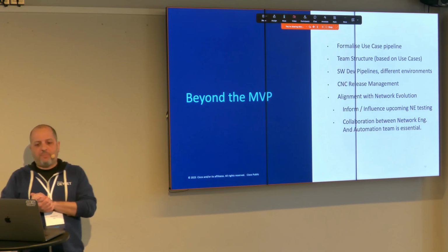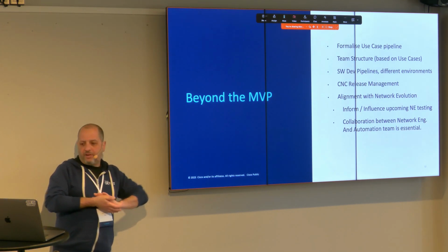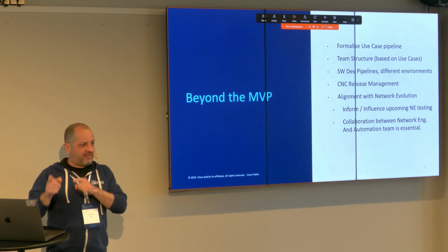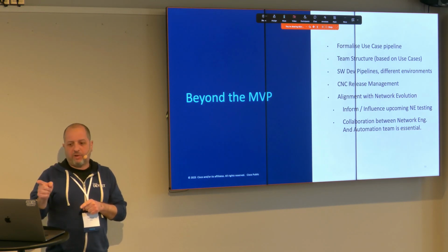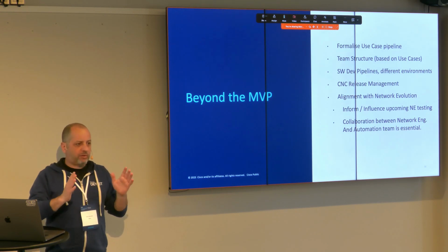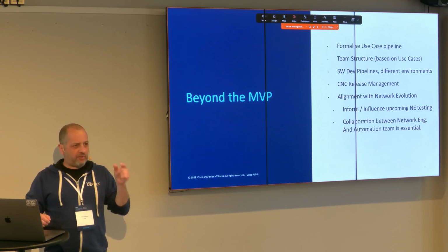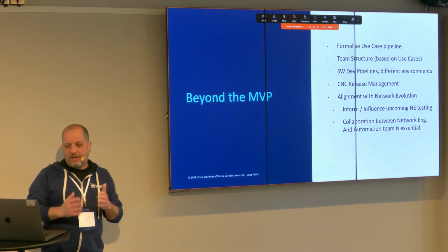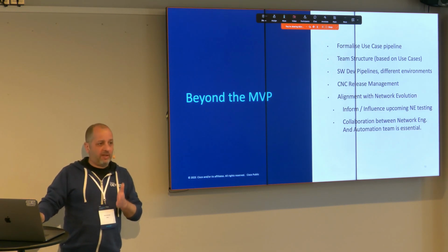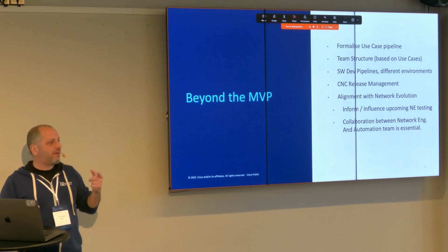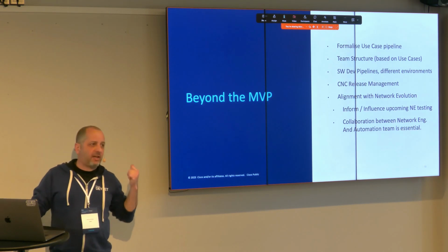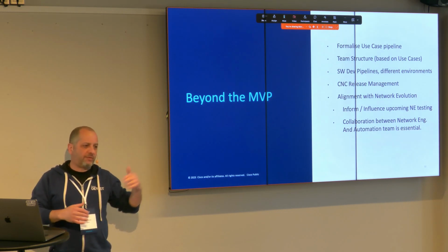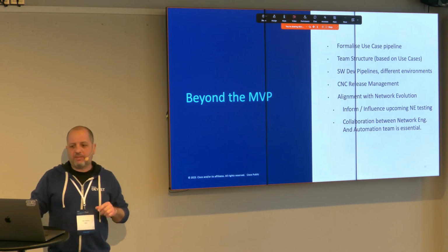Last slide for me is what happens beyond the MVP. So you need to have a plan for the use cases that you want to implement on the platform. By the way, in this deck you will find some reference slides. One of these reference slides is a template to define what a use case looks like, what is the business requirement for that use case, what network element it touches, and so on. So you can use that as a template to define your pipeline and the priority of those use cases. Other reference slides you will find are about the points that I've touched about the key things to understand. You will find an expanded list of those points that I've discussed with some comments as well.